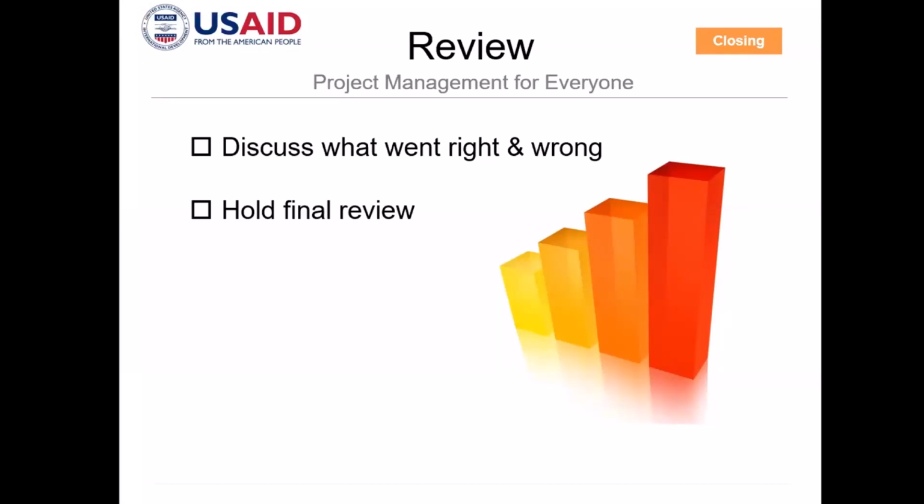So this is where we will have to review if all the requirements that were published in your project plan have been met. And in this review, you will have to discuss what went right and what went wrong. And after the final review, you will come up with the lessons learned on what happened when we implemented this project or program.